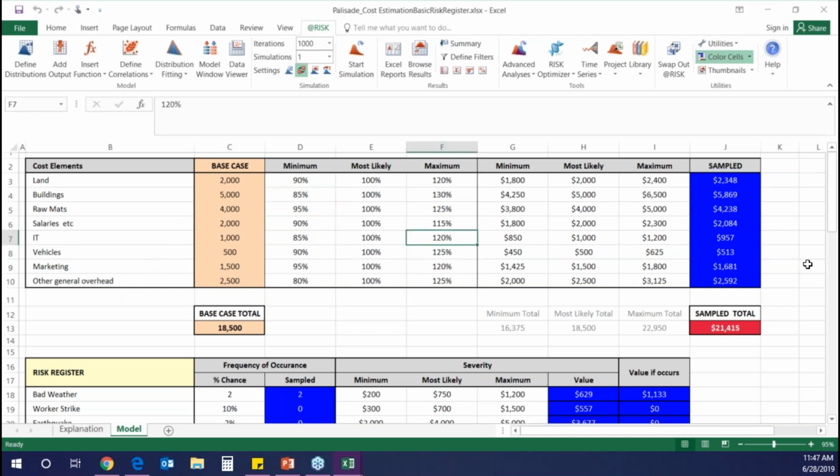So this is the same thing. What I did was change from RiskPert to RiskTriangular, just so that you can see a difference, and you can certainly do that. PMI recommends PERT and triangular. Our consultants, like I said before, do as well. They recommend PERT a little more, but that's okay. And we've summed them up.